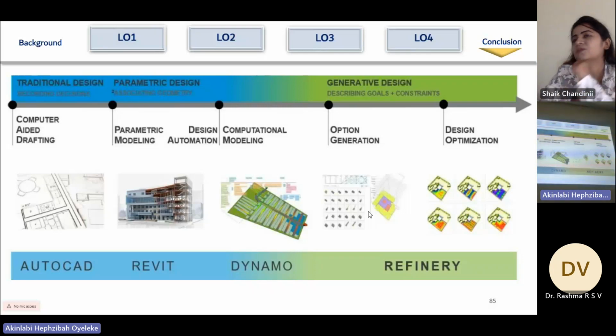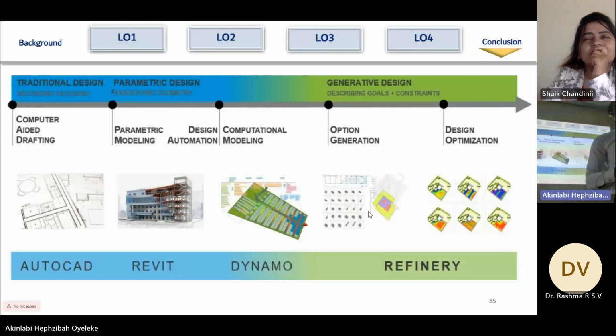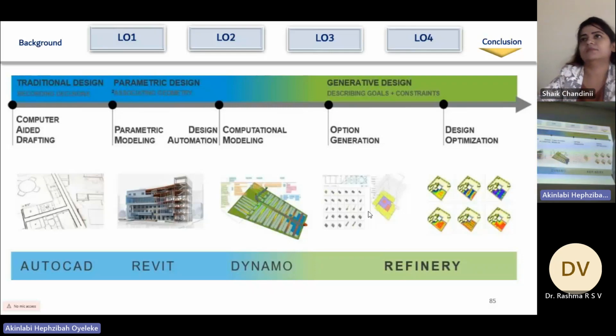Lean construction is modern, about a decade old, introduced into construction to eliminate waste and to reduce rework or material usage. One of the things they do in lean construction is the concept of arrive when needed, when materials arrive on site when needed. So there is reduced storage cost or inventory cost. Also, materials are planned so that only what is required is used.